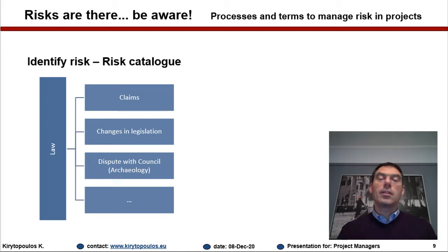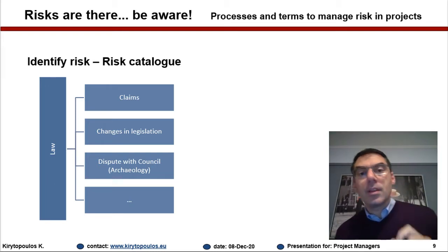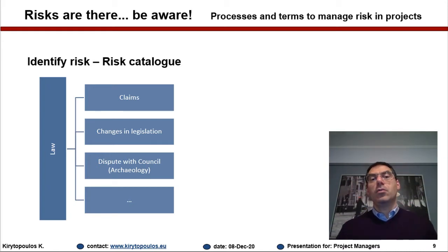Please do remember that no matter how good your risk catalog or risk breakdown structure is, when it comes to your specific project, the risks are going to be very, very specific to the project. You should not stop at something generic, because this will only give you the opportunity to take generic actions in order to respond. But if you go very straight and specifically talk about your project, so it's not changes in legislation generically, it is a very specific change that I have identified that the government, for instance, is talking about a new law which might affect the project.